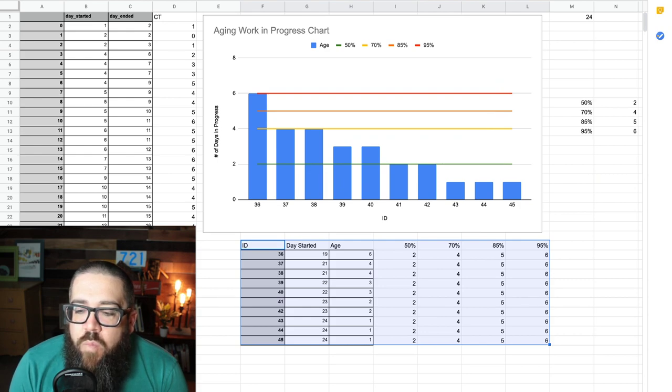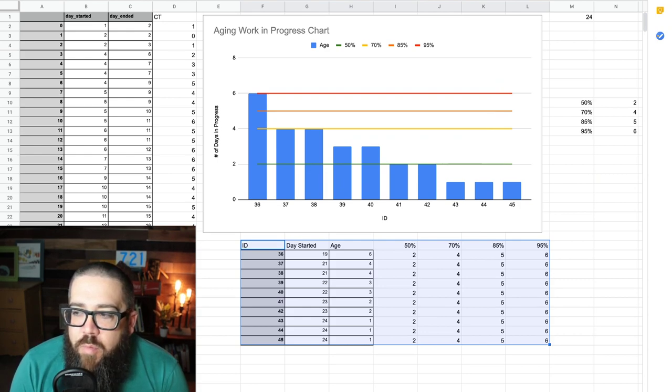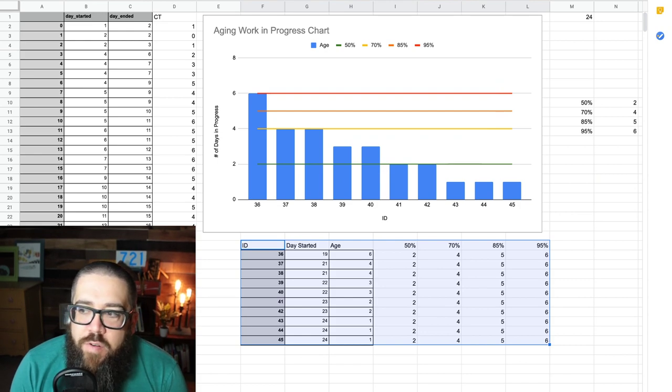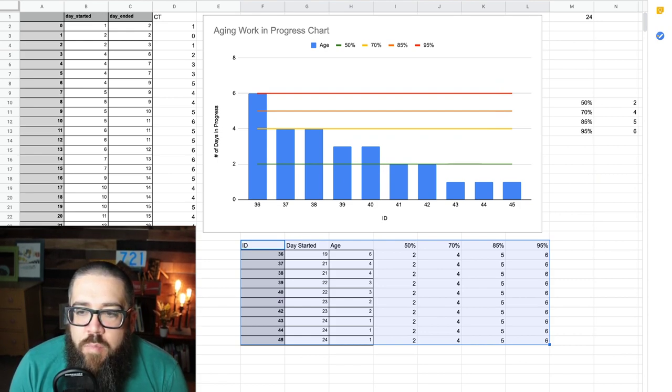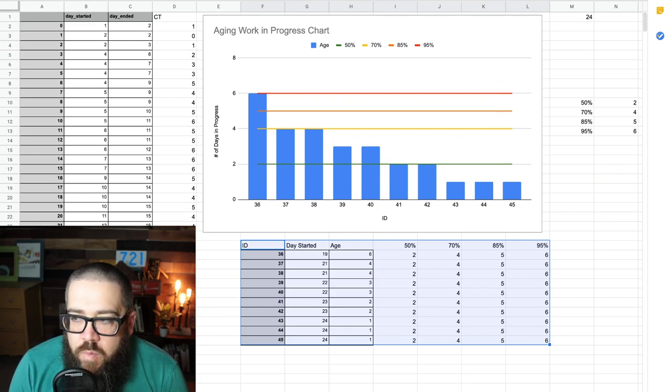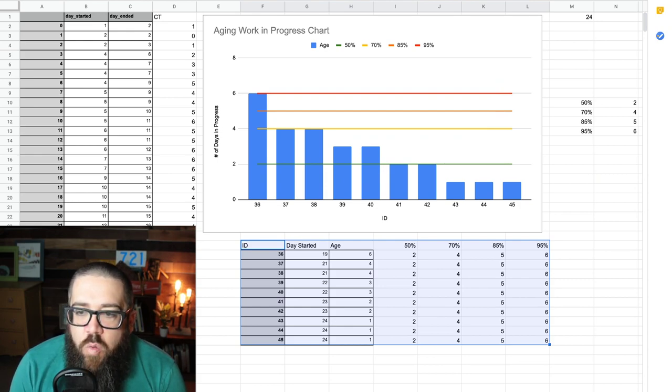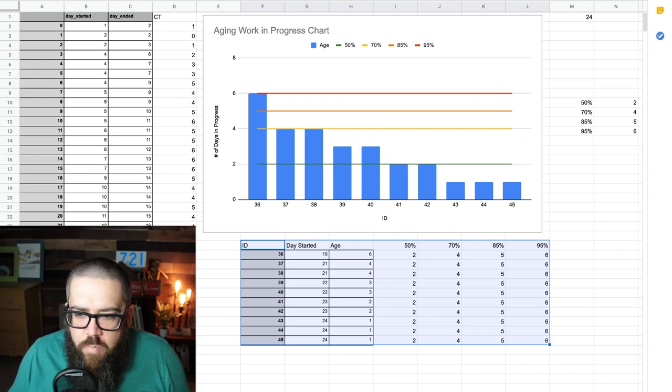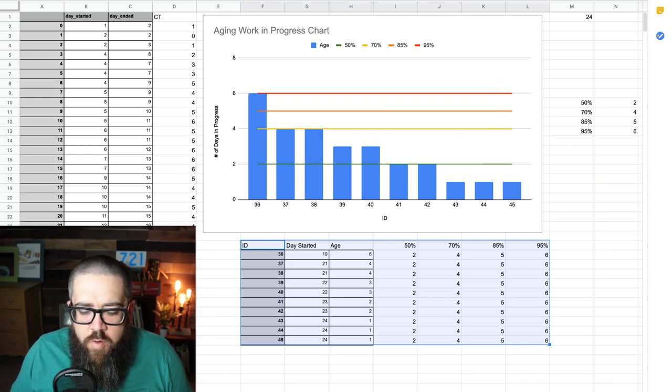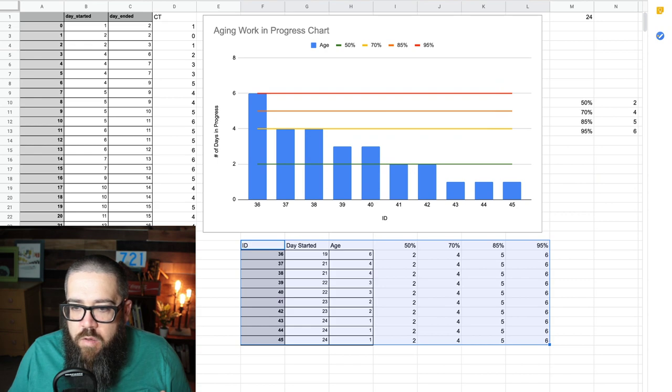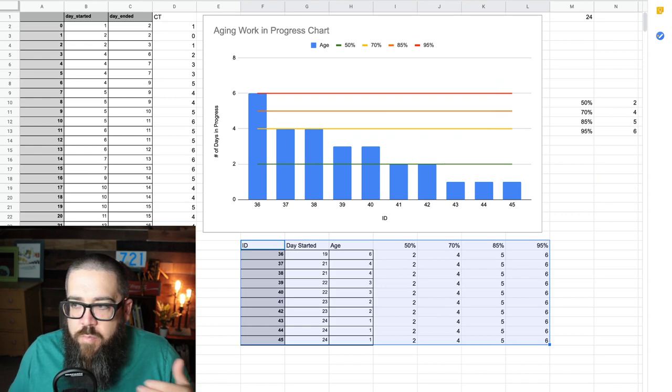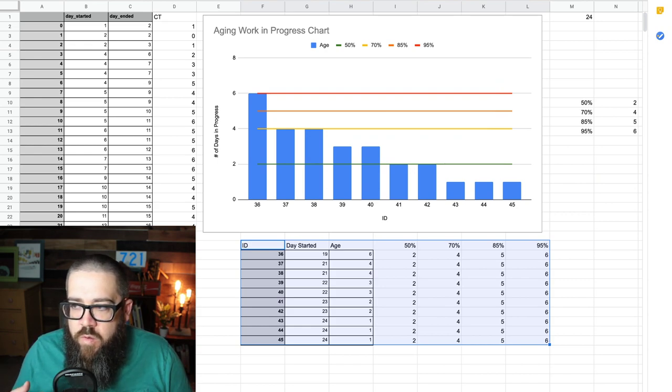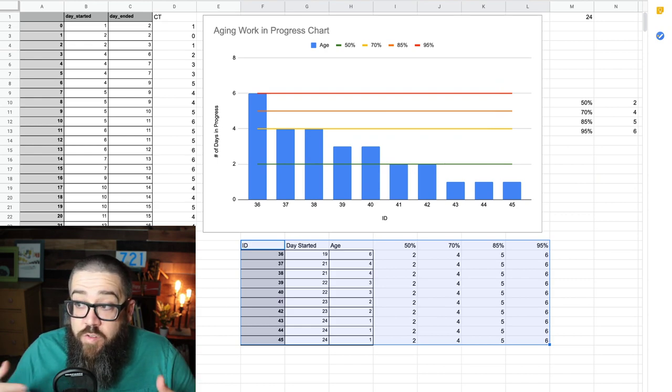So, the other bars here, then, are the 50th percentile, the 70th percentile, and the 85th percentile. So, what I tell teams is that whenever an item gets in between the 70th and the 80th percentile, or starts approaching the 85th percentile, it's time to stop your normal work. It's time to swarm on that, pair on that, mob on that, something. We have a problem here. Scrum master, manager, flow master, this is where you're asking the team, what is the problem, and how can I help?